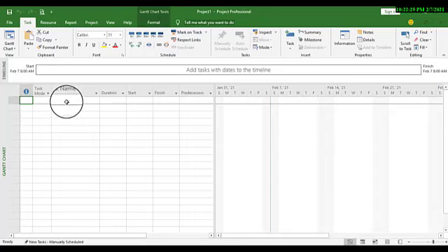From our previous studies, we learned that the WBS is when you have a project and that project has been divided into various sections. For instance, if you are building a house, you have the foundation works, the interior works, and the exterior works. These are the work breakdown structure of the house. However, each of these has activities that we are going to perform under it.